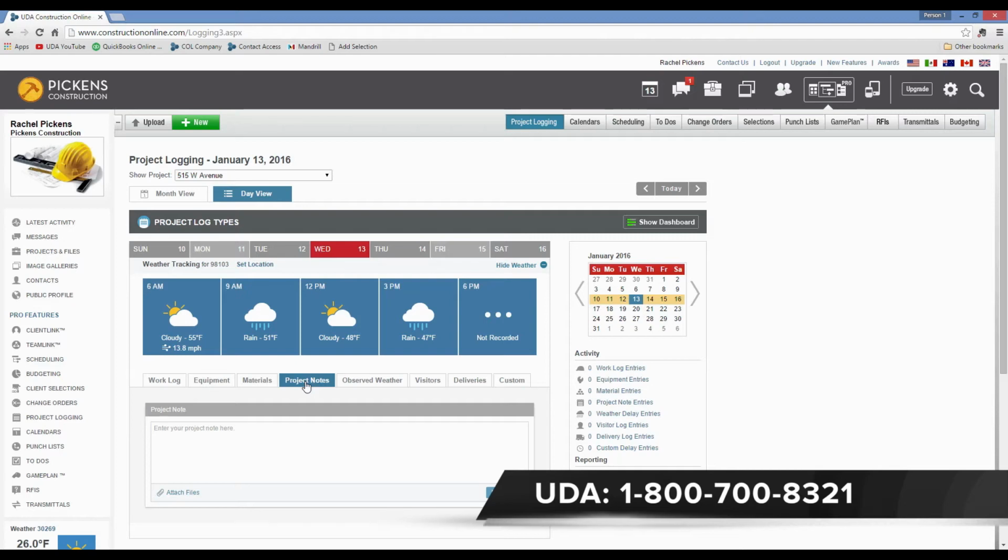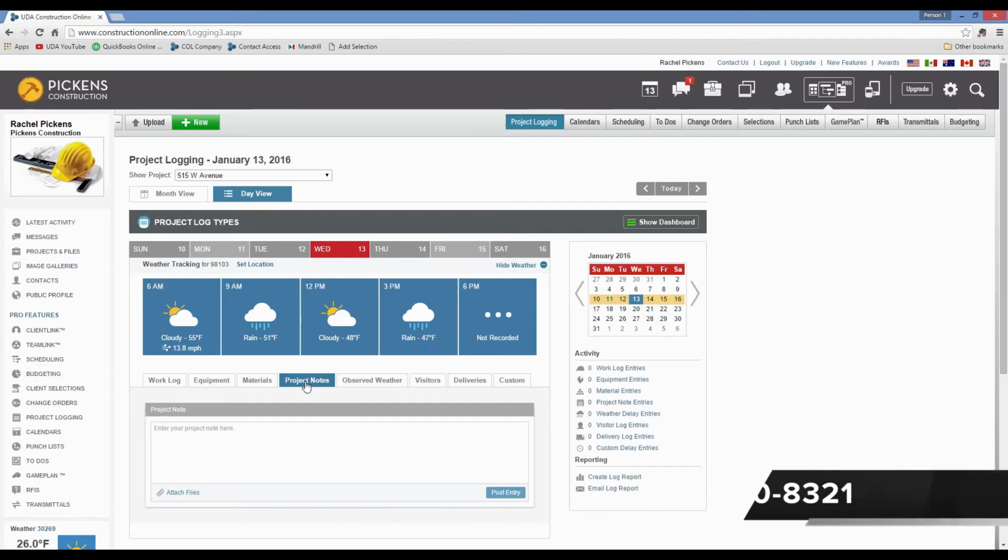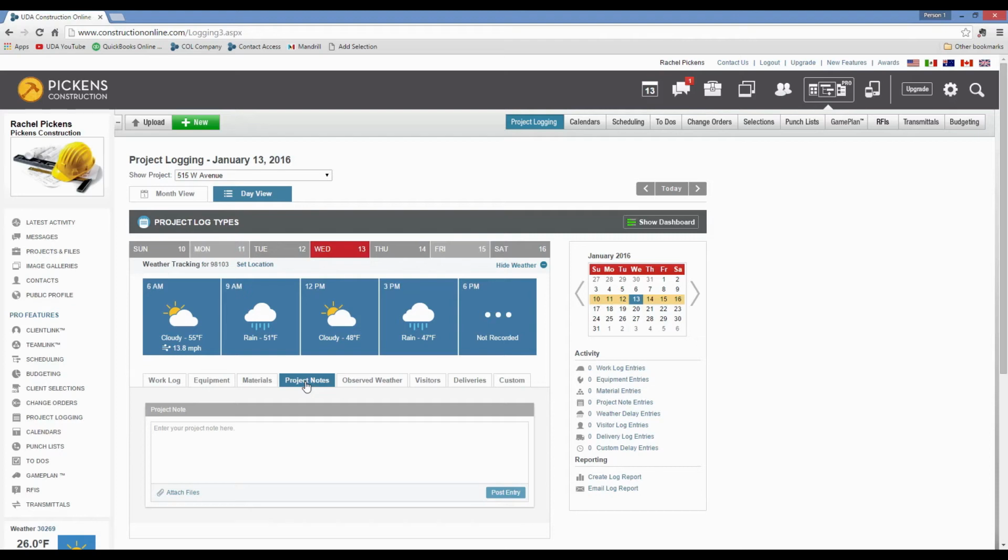Just think about the benefit, or how better records can really help you. For example, one of those is thinking about deliveries. It's great to have on-time deliveries, but late deliveries, of course, can cause delays. So can early deliveries. Think about it. If you have an early delivery, then it might cause a problem too, because you have to stop work in order to move the equipment or to make room for the materials that you can unload. Or perhaps you have to pay for the waiting time for the driver because he's 2 hours early and the crane isn't available for you to unload, or whatever it might look like.